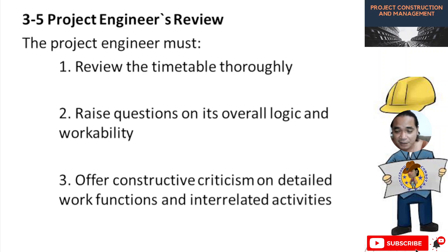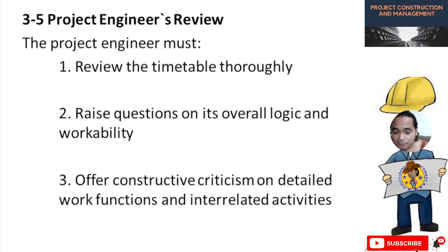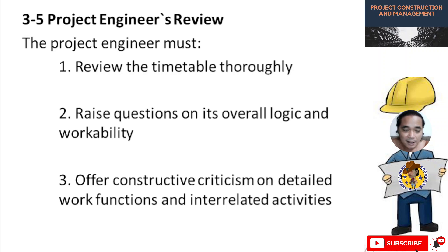During handling of a project, especially on site, the project engineer has to review everything. Number one: review the timetable totally — you cannot take the schedule for granted because it is your guide in completing the project. Number two: raise questions on its overall logic and workability. Number three: offer constructive criticism on detailed work functions and interrelated activities.